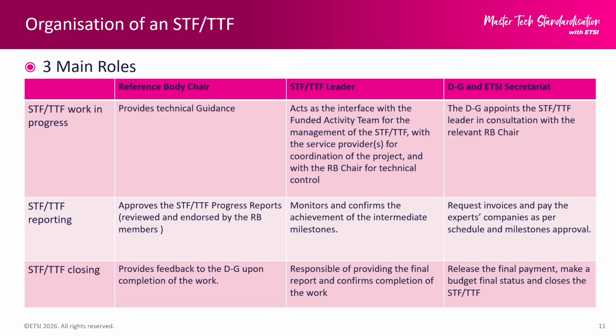In terms of organization, the STF or TTF leader is appointed by the ETSI Director General in consultation with the relevant reference body chair. And that leader then acts as the main interface between three key actors: the funded activities team for the overall management of the TTF or the STF, the service providers for day-to-day coordination of the work, and the reference body chair for technical oversight and control.